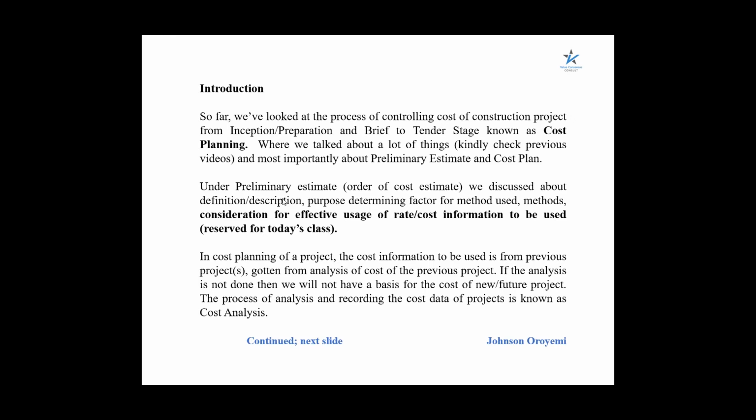Now, like I've said, cost analysis is so much more important because the cost information we are going to be using in carrying out the cost planning of a project is actually going to be from previous projects, and that cost information is gotten from analysis of the cost of previous projects.